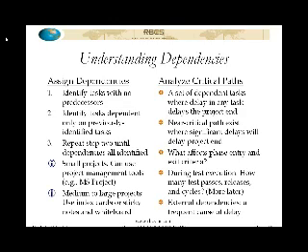You also want to look at phase entry and exit criteria, because these are typically bottleneck points on a project. Now, they're milestones that have to be satisfied before a whole bunch of other tasks can start. So they're typically going to be on the critical path, these entry and exit criteria. So you want to look really carefully at those to see what are the risks associated with not meeting those.